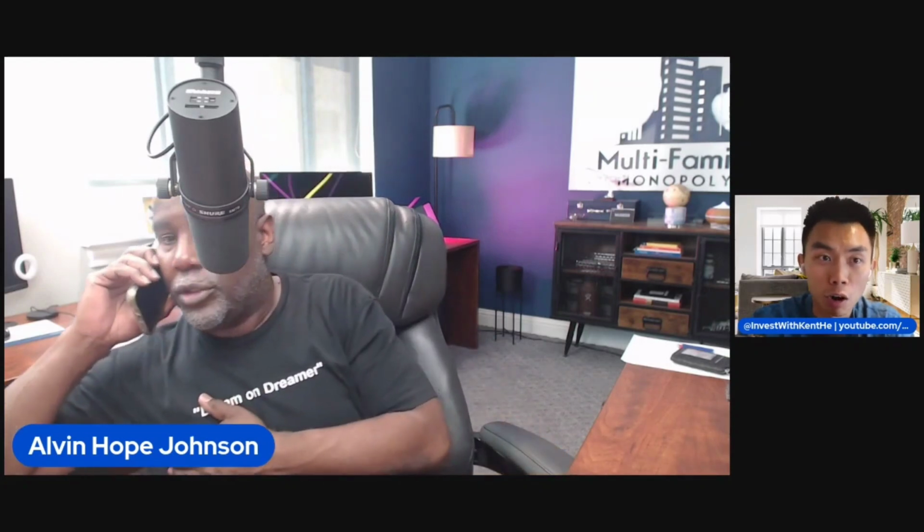Yeah, I absolutely do think so, because at the end of the day, from a conceptual framework perspective, you have to understand what your city and county's specific stipulations are for development. And once you get those stipulations in place, you're going to make sure that you have your engineering and your architects on the same page and truly understand, am I meeting all of the specifications that the city and county want from the development? Based off of that, it's almost like a punch list. I want to simplify it as almost like a checklist. You have to comply with everything, especially if they are annexing you into the territory, especially if you're in the ETJ, extraterritorial jurisdiction. That has to allow you, if you want access to utilities, which is really important, right? Everybody needs water, everyone needs electricity. If you want that benefit for your citizens and the residents of the development, you have to comply with it and make sure that you are following that checklist when you apply for any of the planning and zoning items.